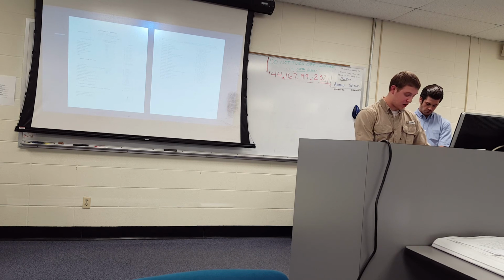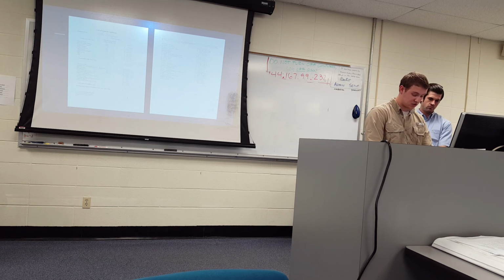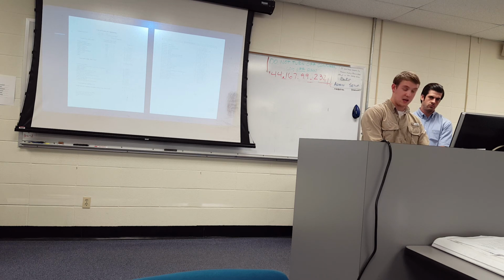Our payment and performance bond rate was 1% of the total price of the project. Our general liability insurance rate was 1%. Our builder's risk insurance was 0.5%, and our fee, as I mentioned before, is 15%.